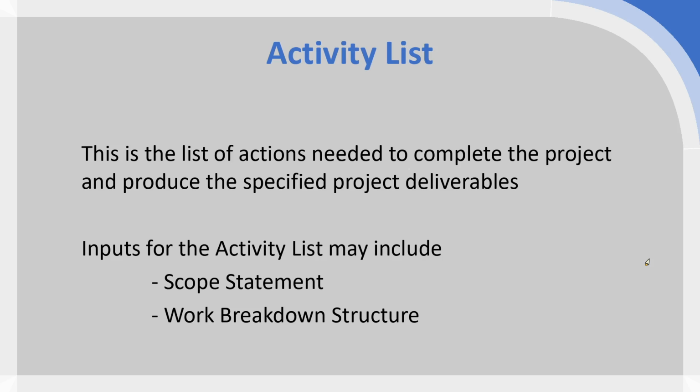as well as being needed for us to develop a CPA, so a critical path analysis, for us to understand what the relative importance of each of the activities on our list are, and which will affect our completion time if they are delayed. But all of those things need this list of activities before we can create them. So it is an important foundational piece of documentation that we have to create first.